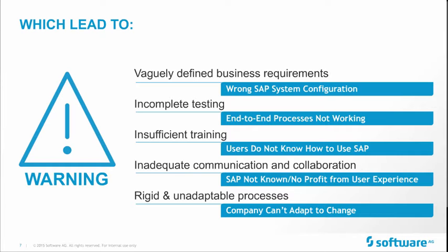If you do only functional testing, you may be able to test creating an order in the SAP system, maybe the VA01 transaction, but you won't be able to test the specific process I mentioned before, for example, having a customer in Germany, sending the bill to France, and delivering somewhere else. If you don't test it beforehand, you're not sure it's working once the system goes live. That may be a problem, because you're not delivering the materials, you're not sending the bills, and that's not good for your company.